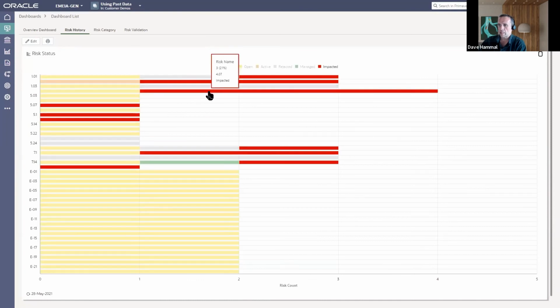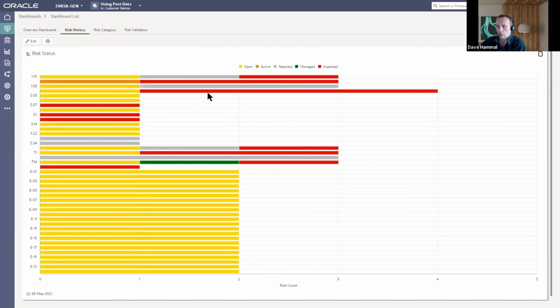And again, I think this is that same one, 407, where it's happened on 3 of the 4 different projects. So again, when I'm looking at probability of a risk occurring, I can look back to see how often it's occurred on projects from my history to help drive that discussion, to help inform me. A lot of this comes about by being able to have this common risk ID.